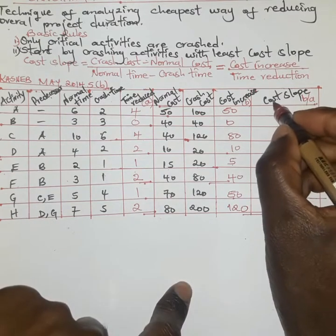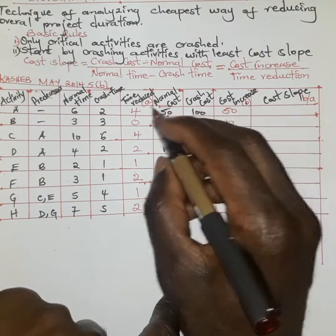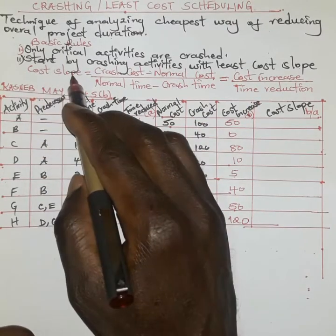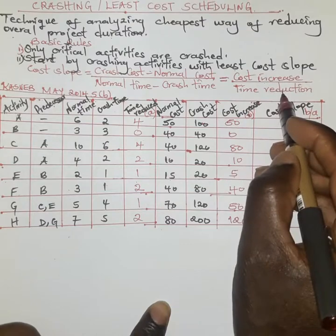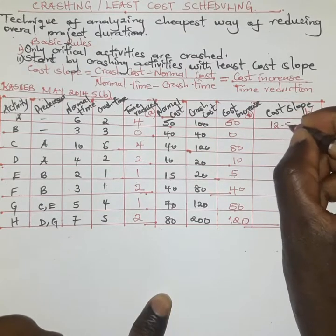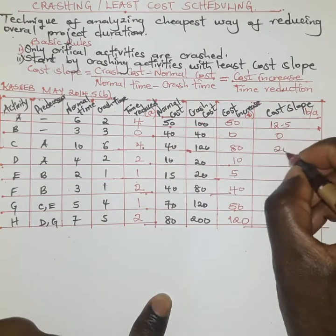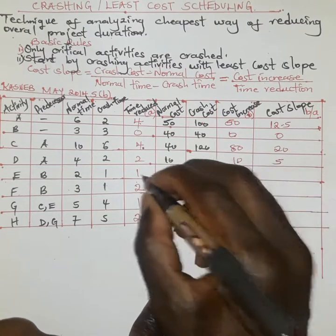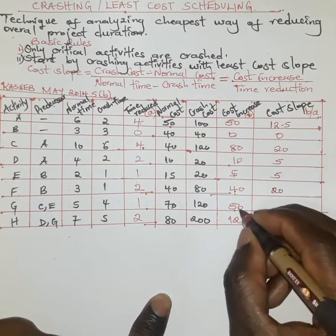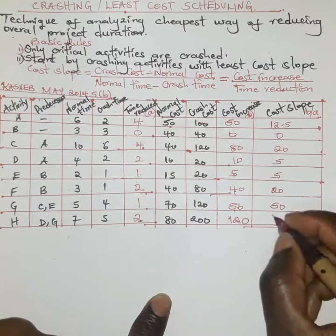To get the cost slope, we divide the cost increase by the time reduced. The formula is: cost slope = cost increase / time reduction. So: 50 divided by 4 gives 12.5; 0 divided by anything gives 0; 80 divided by 4 gives 20; 10 divided by 2 is 5; 5 divided by 1 is 5; 40 divided by 2 gives 20; 50 divided by 1 is 50; and 120 divided by 2 gives 60.